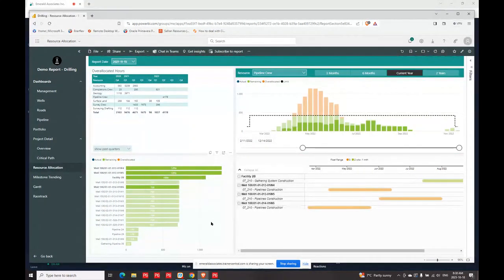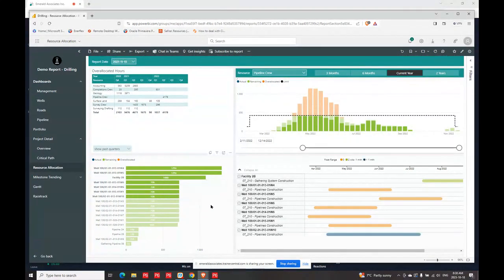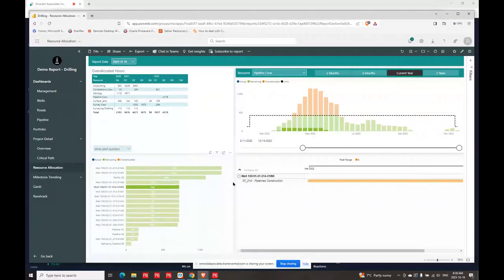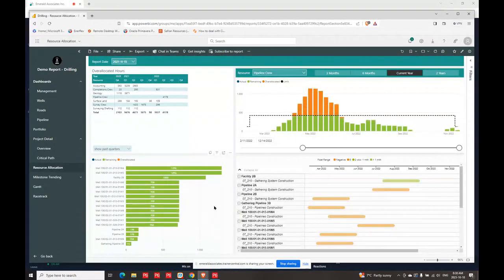And if I go down, it'll be able to show you exactly where you start to go into the overload. Now, you would know the prioritization on these codes, so you know which one could be potentially moved. See, if I add this one, I'm into the overload, that kind of thing. But perhaps if I took some out and added another one in, you may be able to get to the same level. So it can give you some very valuable information that way as well.